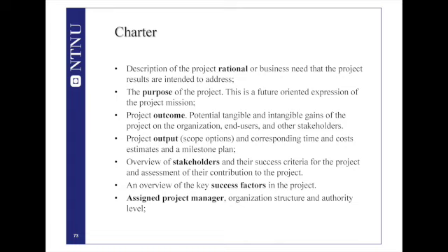And then you define the output. This is what you will be doing. What will you produce? What is it? Is it a document? Is it an element? Is it a component? Is it a robot? Is it a concept? And this is important because they define your scope. This is the actual work that you will be doing. And of course, as usual, who are the stakeholders and what are their success criteria for this project, and how they will assess these success criteria.